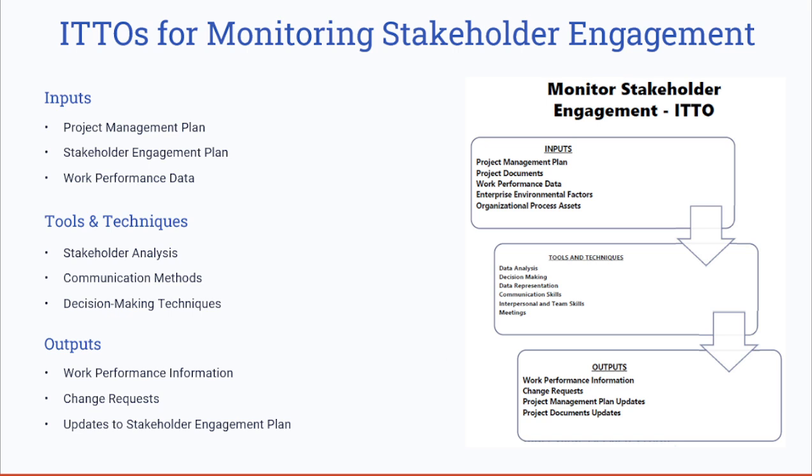To start with, the key ITTOs here for monitoring the stakeholder engagement. Monitoring stakeholder engagement follows the PMI structured ITTO framework. Inputs such as the stakeholder engagement plan guide the process. Also, you can think of it as part of the project management plan. Tools like stakeholder analysis and decision-making techniques help assess the engagement levels. And the outputs here may include updated plans or change requests to enhance the communication strategies.